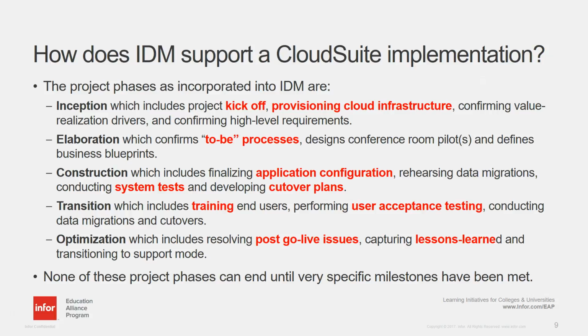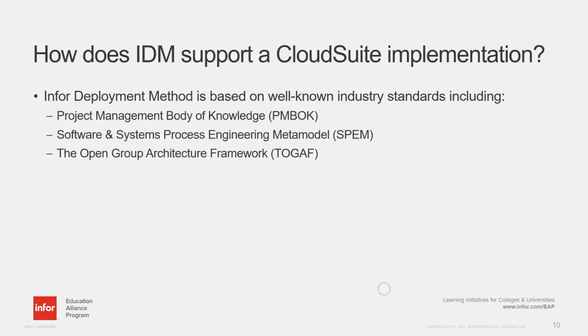And note that each one of these 5 project phases will not end until a very specific milestone has been met, and until there is indication that we're good to go, we do not move on to the next phase of the project.